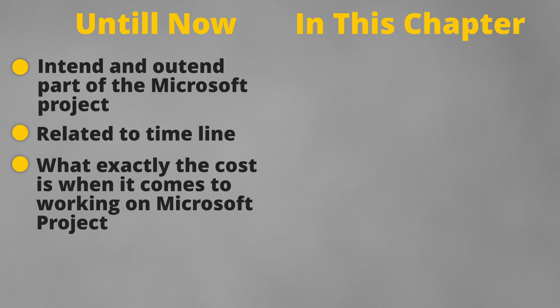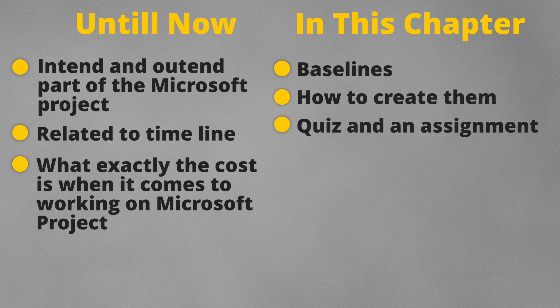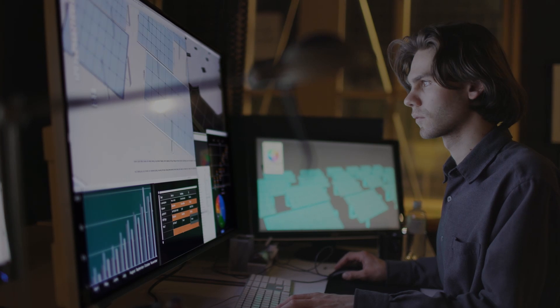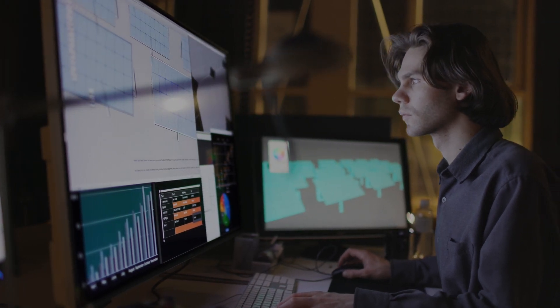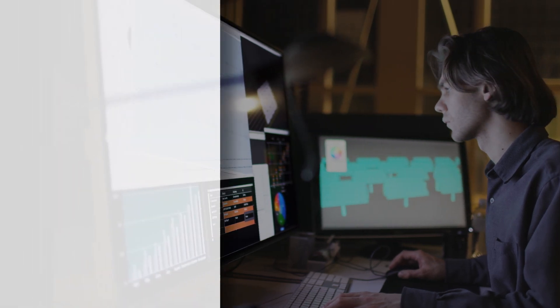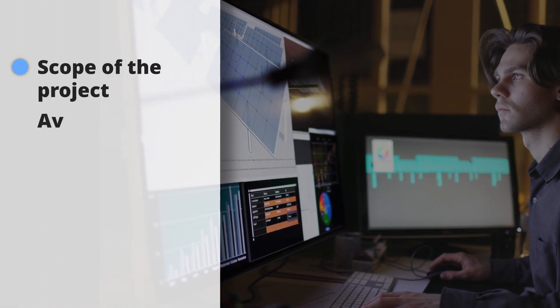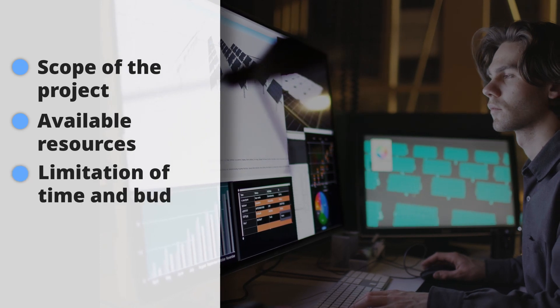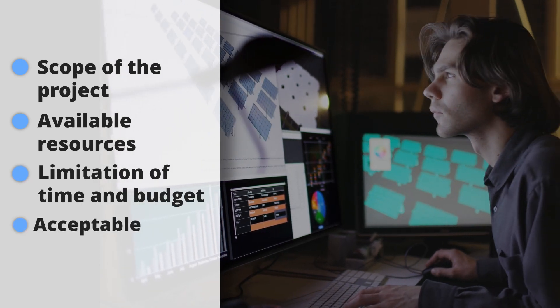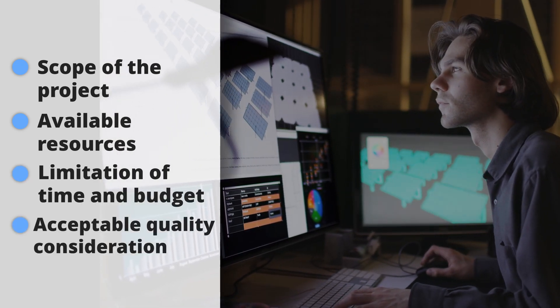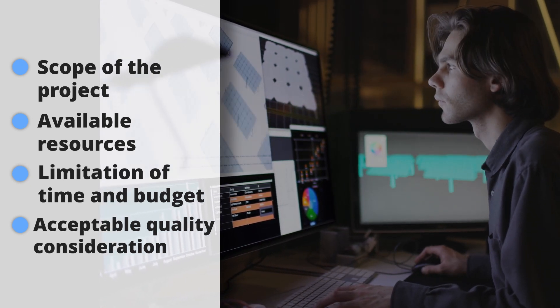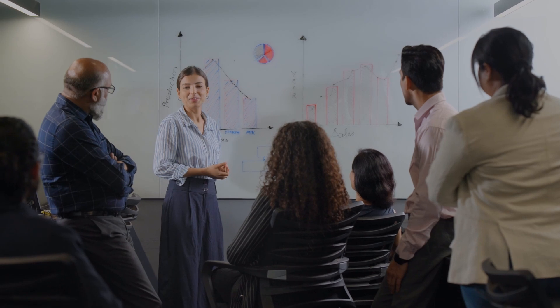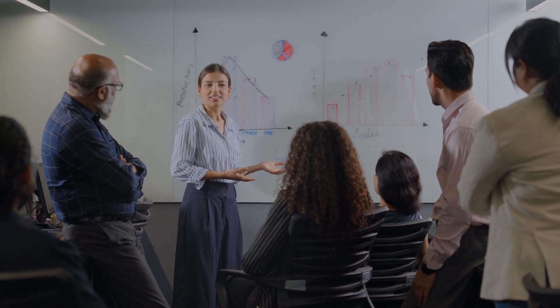In this chapter we will be looking into the baseline, what exactly are baselines and how to create them, followed by a quiz and an assignment. When you have created a project schedule that satisfies all the requirements of your project including the scope of the project, available resources, limitation of time and budget and of acceptable quality consideration, then it is time to go to the next step and that next step is to execute your project.